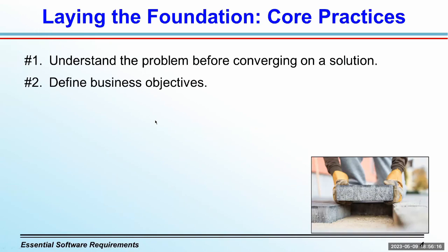The stakeholders need to understand why this initiative is being launched and its business objectives. I'll talk more about this shortly. Now, when you launch a new initiative, you might not know just where to draw the line between what the solution should and should not include. So an important foundational practice is to establish that what's in, what's out boundary. It's a solution scoping action.